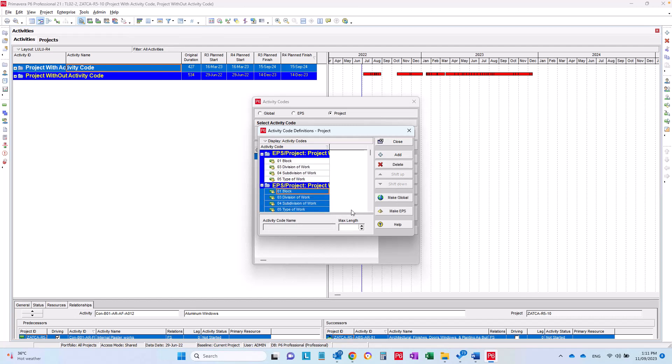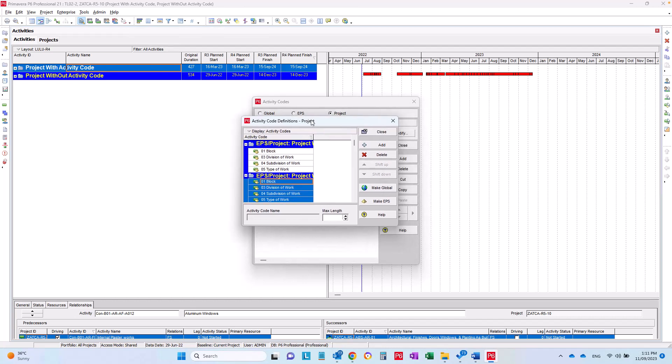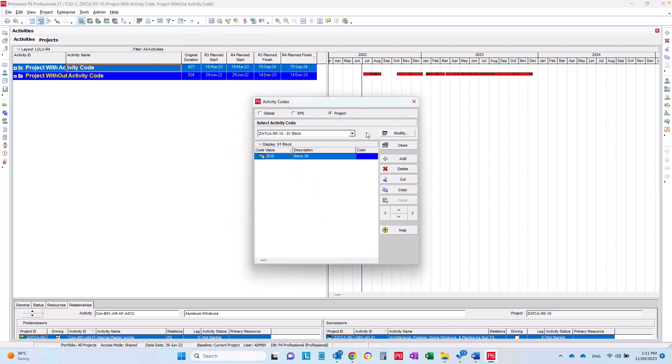Also, please be sure that you always choose the project. Don't make it global, don't make it EPS. Make the activity codes in the project so no errors will happen when you import and export your project.